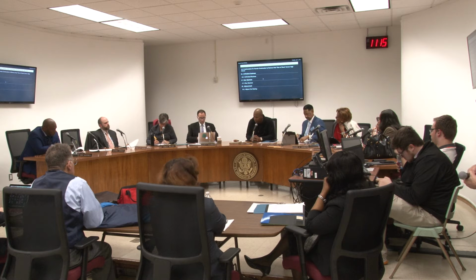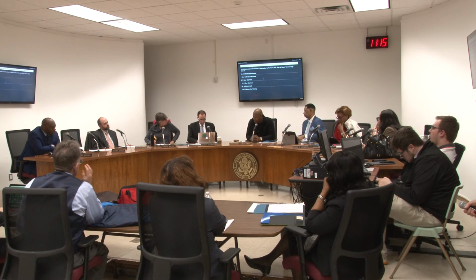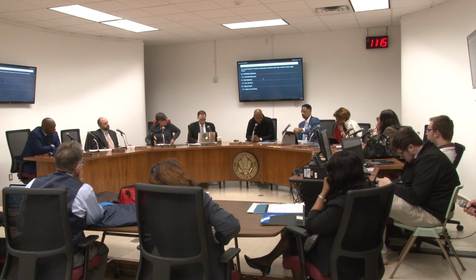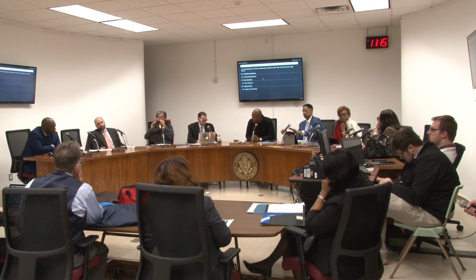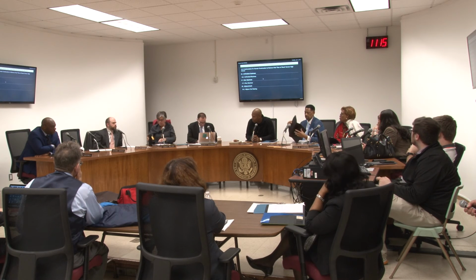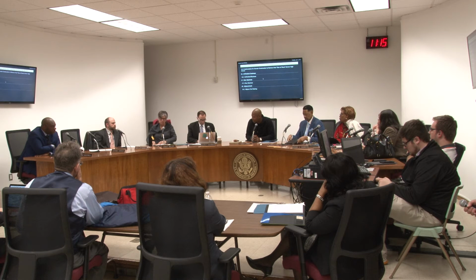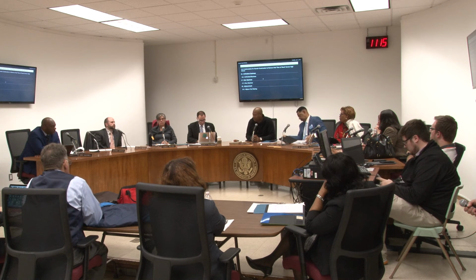I believe on the tile removal, the low bid contractor was, should I say, not the most responsible. Our experience with that particular firm, who were on the pool job before, was extremely slow, causing maybe a couple of months of delay, poor workmanship in terms of work conditions, keeping the area clean, refuse removal, a litany of items.